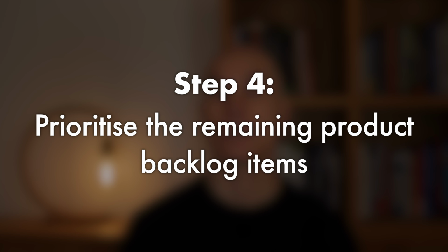Step 4 is to prioritize the remaining product backlog items. Now comes the fun part. With a focused product backlog, prioritization becomes much easier. A powerful approach, especially for newly stocked product backlogs, is to prioritize by risk: user, technical risk, and business risk.